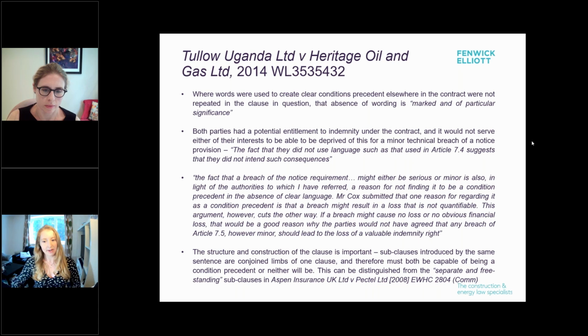In addition to providing parties with ample opportunity to investigate a claim, they also assist, it was pointed out in this case, in creating contractual certainty. However, on the other hand, it can result in a party losing a contractual right for some sort of trivial breach of contract that does not actually prejudice another party or cause any loss. So it was highlighted that there is a general reluctance by the court to enforce contractual provisions as conditions precedent. And in this case, it was found that the balance tipped towards this reluctance for the following reasons.